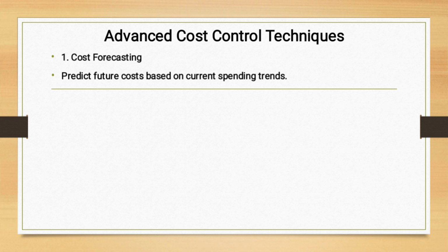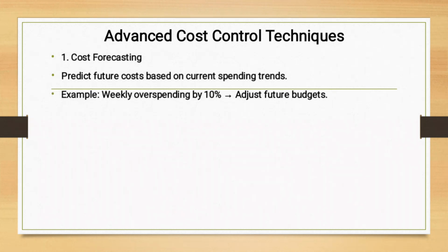So let's say every 2 weeks, the prices on the market are moving up by 20%. That means you as a project manager can have that vision to say, my project which will be done in 6 months' time, I should prepare this amount of money, because I understand that each and every time the prices on the market are skyrocketing. Okay, so that is an example that I was talking about.